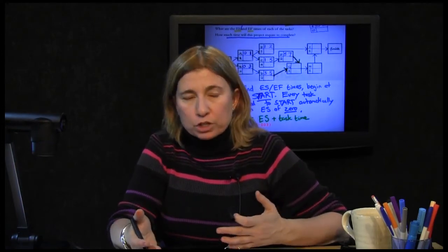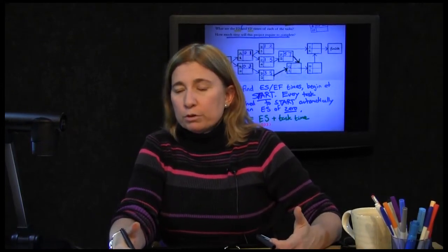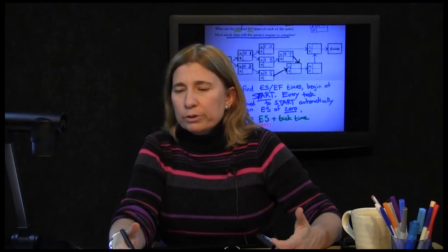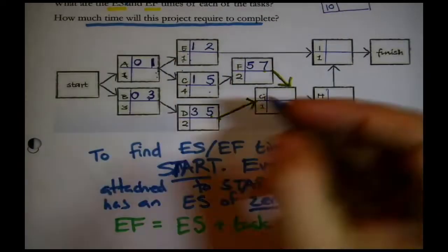When you have a choice, think about it. You have to wait for both of them to finish. One could finish at the earliest in 5 days and one could finish at the earliest in 7 days. They both have to finish before you can start. Logically, what is the earliest that you can start? Well, you'd have to wait around for the 7-day one, right? Yeah, pick the largest.